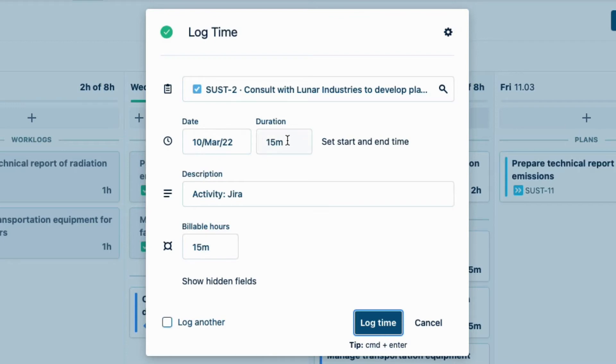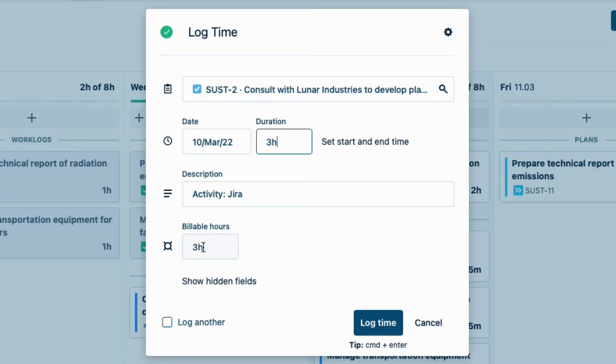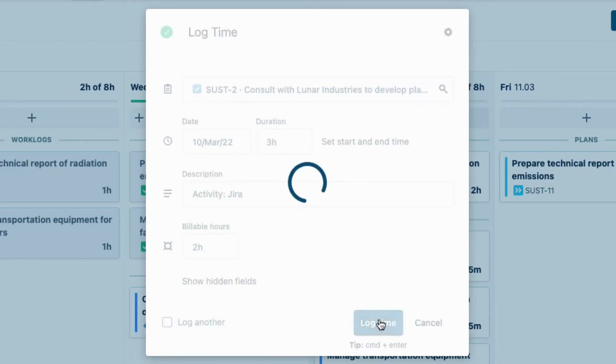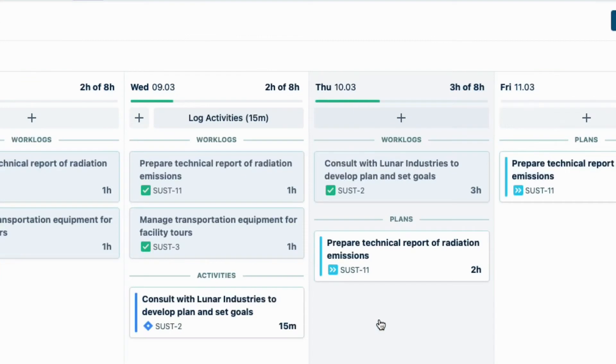I'll enter 3 hours as the total time I worked on this issue, and notice that the billable hours update to be the same amount of hours, which is often what you want. But sometimes it's not. In this case, only 2 out of the 3 hours I did were actually billable work, so I'll change that. I'll click Log Time, and I'm done with that issue.